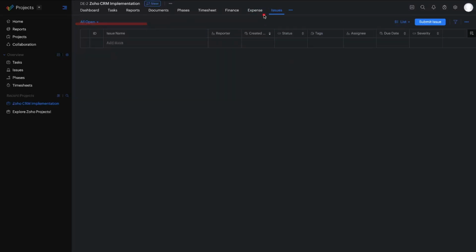These are different issues. This is more of a thing for development. Keep this in mind. With Zoho Projects, this is waterfall type project management, not agile. So the difference there is Zoho Projects helps you manage lists almost like you're in a spreadsheet. Typically with waterfall style project management, you're coming up with all the work up front and then you're just executing a giant list of work. No project ever goes according to plan, but that's kind of the founding ideology of waterfall. Then you have agile, which has been adopted mostly by developers, sometimes marketing and sales, but mostly developers, because they need a more flexible way to manage their work.